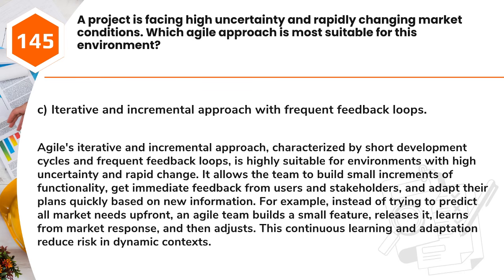For example, instead of trying to predict all market needs up front, an Agile team builds a small feature, releases it, learns from market response, and then adjusts. This continuous learning and adaptation reduce risk in dynamic contexts.